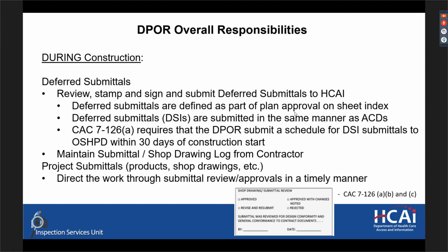What I've seen, and what many people see, is some electrical coordination studies which are required end up being held or not submitted until the 11th hour of any project. And that could potentially hold up project closure, because if that DSI isn't approved in time for the project to close, then the compliance officer won't be able to close the project and it'll stay open until that DSI is actually approved. The DPOR should also be maintaining a submittal and shop drawing log from the contractor.